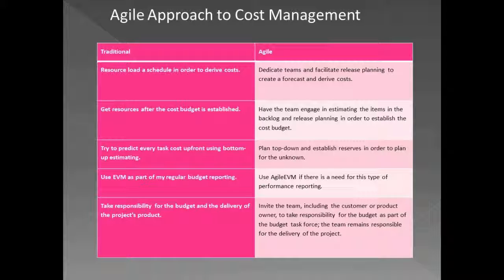When we talk about cost budgeting, in the traditional approach, the project manager prepares what is called a cost baseline, and derives the funding requirements from this baseline.